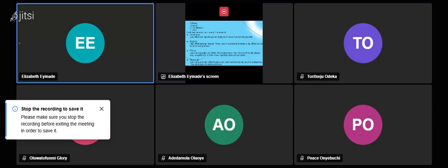Then we talked about RICE, which is reach, impact, confidence, and effort. Each of these ends up in four quadrants, which show you the quick wins, low effort, high impact, and the value. Then the big bets, that's high effort but high impact. The fill-ins, and we have the money pit as well. The money pit is not advisable that you go into.